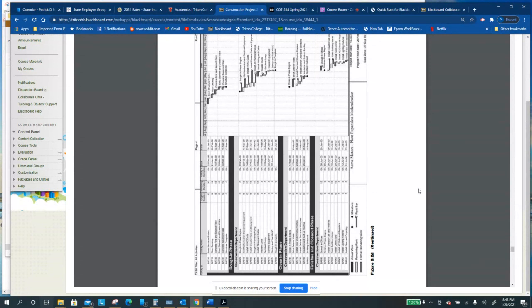That sounds good in theory, but in reality, you can't have 5 guys physically working in a certain amount of space, or else you're going to actually slow yourself down. You're going to be running into yourself. These 2 guys are standing there waiting while these 2 guys are putting this there. So while there are parameters that we can adjust, you can't just assume that X equals Y and it's a direct relationship.